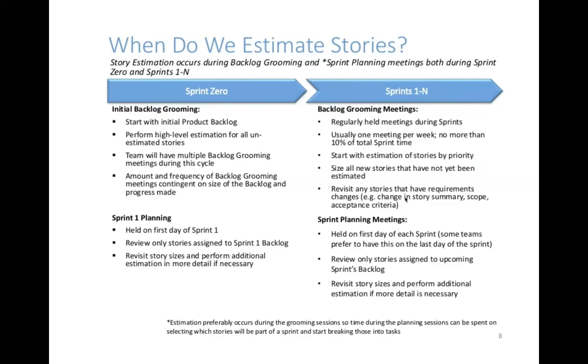When it comes from the product owner, the Scrum team has to provide the story points for the user stories. They have to estimate all these things during the grooming meeting. Whenever the team provides estimations during the grooming meeting, they are high-level estimations. It's not accurate, because during the grooming meeting the product owner is showcasing all the requirements he needs until delivery.